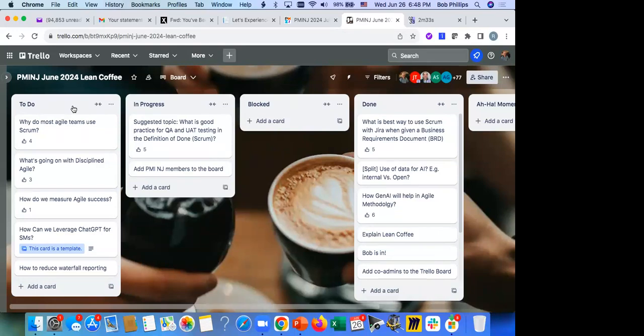Sorry, Nathan, what I wanted to add was, in our organization, we would typically have an epic for non-functional requirements. Just like a BRD used to have a section for functional requirements as well as non-functional requirements, we would maintain a list of all the stories under the non-functional requirements bucket, and each of them will have its own acceptance criteria. And then the appropriate testing, as Seth was saying, the stress testing, the performance testing, would be done by an external vendor for us. And as the Scrum Master, we will make sure that those tests are passed as appropriate before closing that story in the Jira board. So we would maintain all the non-functional requirements as a part of a separate epic.